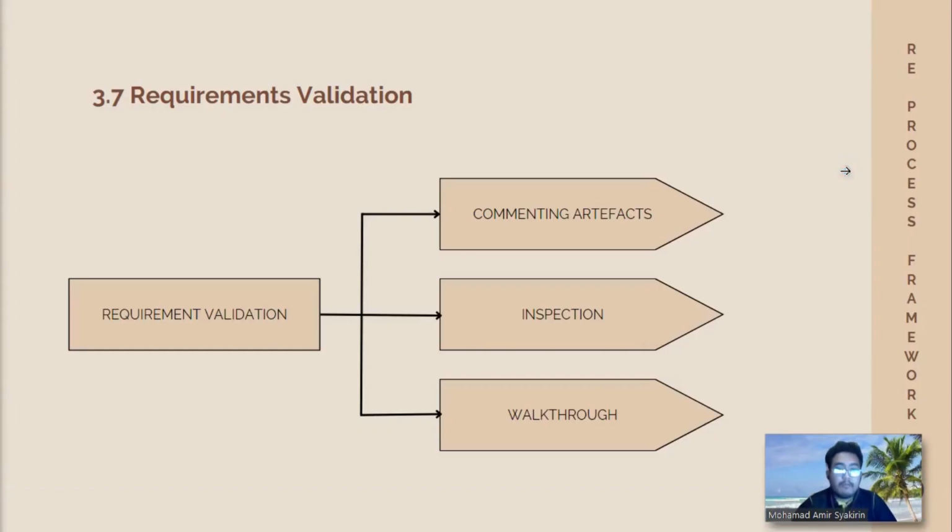Next, we proceed with requirement validation. For requirement validation, we did a few review sessions where we met with all the stakeholders. In those meetings, we displayed and described all the requirements gathered by our teams. After that, the reviewer team also gave feedback by commenting and approving accepted requirements.